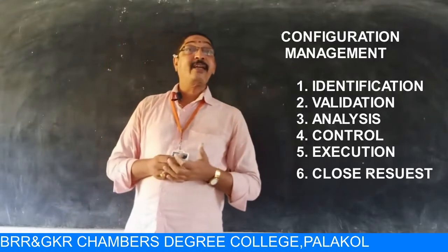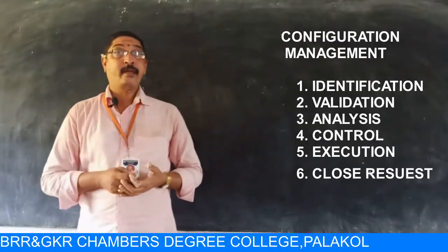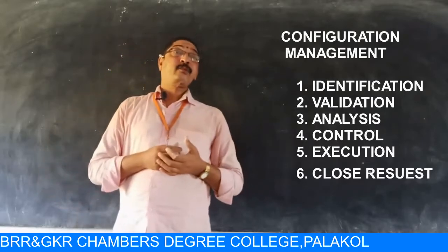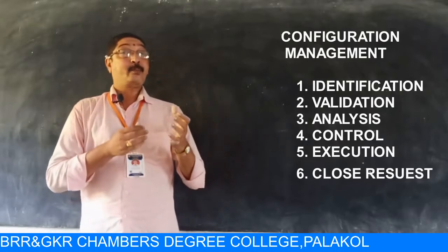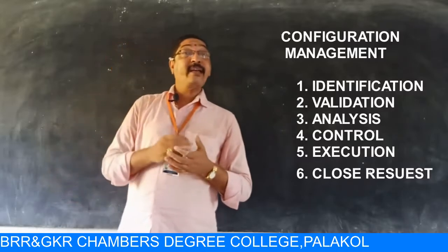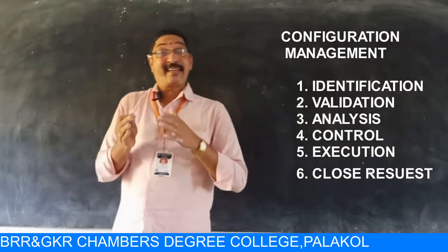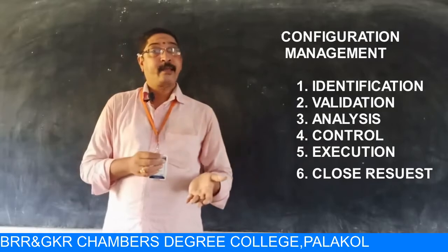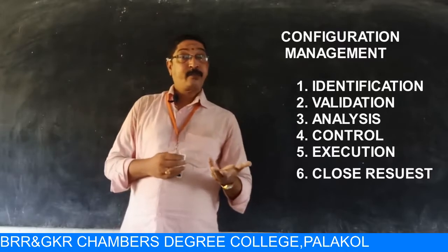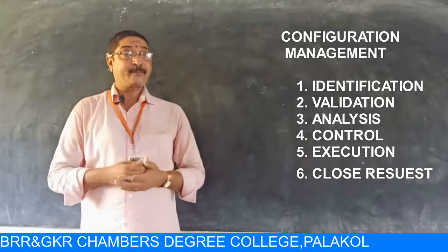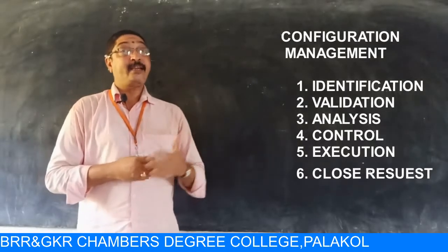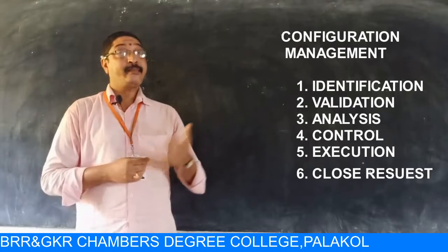And the third activity involved in this is analyze. The developer needs to analyze whether the requirement is proper or not, is it compulsory or not, and they must also analyze the impact of this change of requirement on the project. That impact may be in terms of schedule, effort, finance, maybe anything. What will be the impact of this change on the project? It must be analyzed. That is another stage.